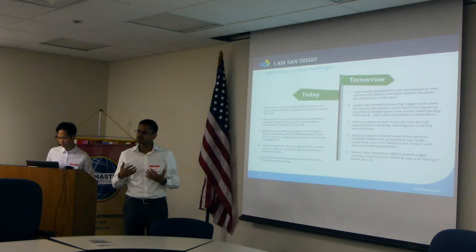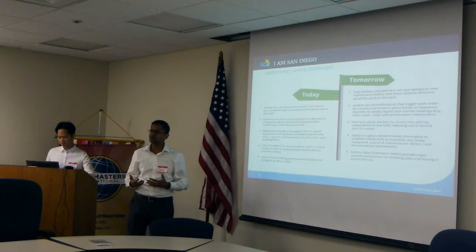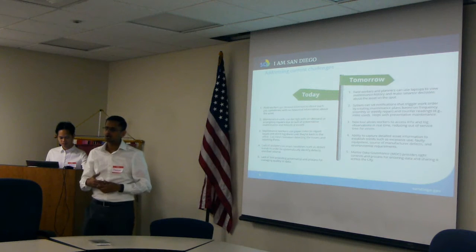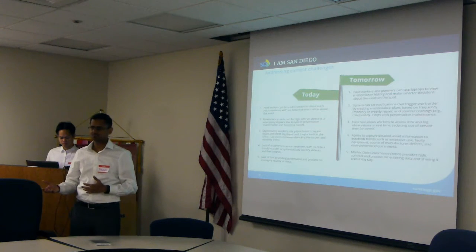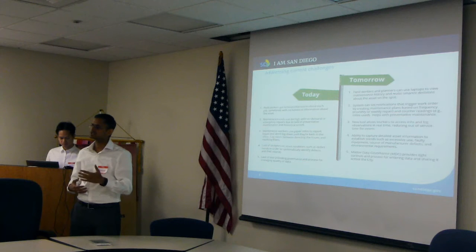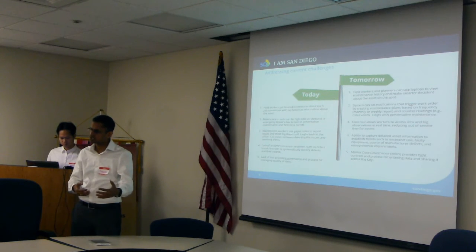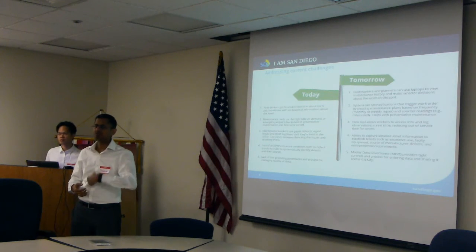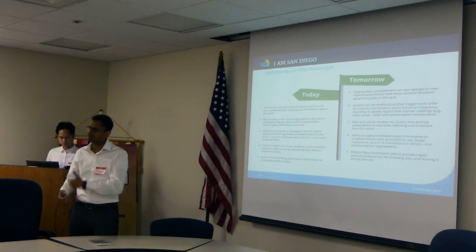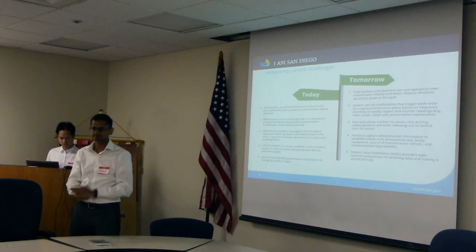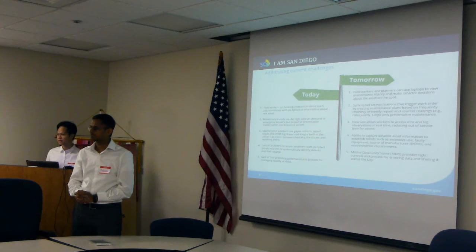Right. So based on all the considerations, based on all the factors that we feed into Riva, we would know when this asset should be replaced, how long it takes for us to do that, what the cost of replacing an asset is, and whether we should be considering it as a SIP project this year, next year, and things like that. And if we consider it as a SIP project, it feeds into PPM, where we take it through its life cycle, and then feed that information back into the system, back into Riva. Okay, any questions?